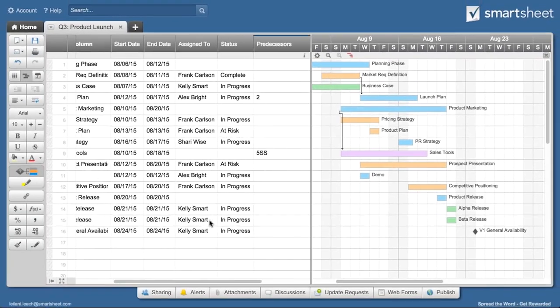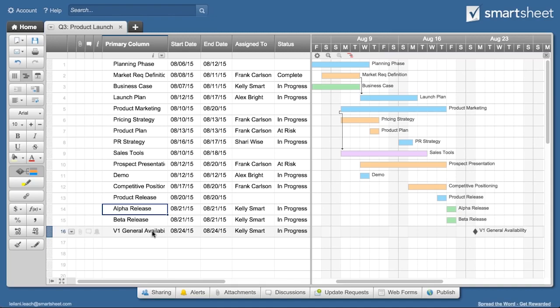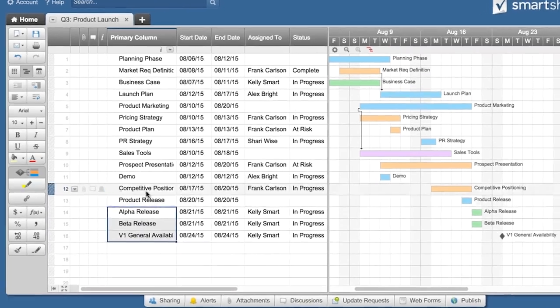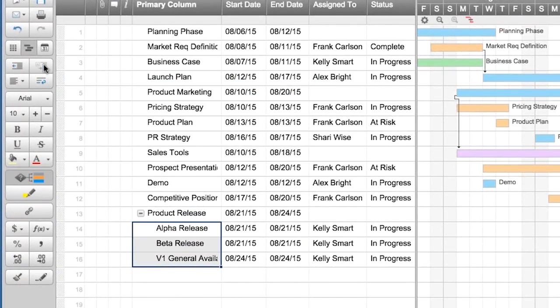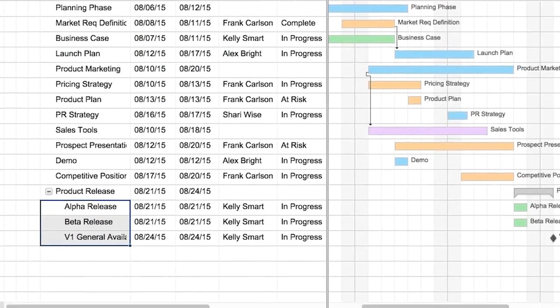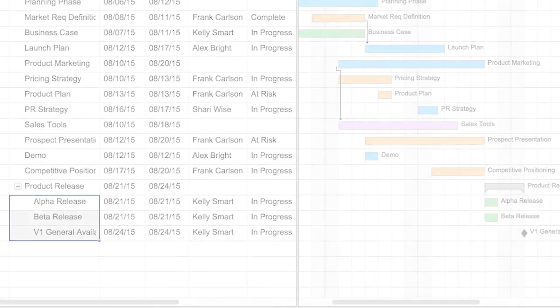Subtasks help you structure projects and summarize progress. To create a subtask, click on the indent icon. Smartsheet uses the start and end dates of your subtasks to calculate the start and end date of your parent task.